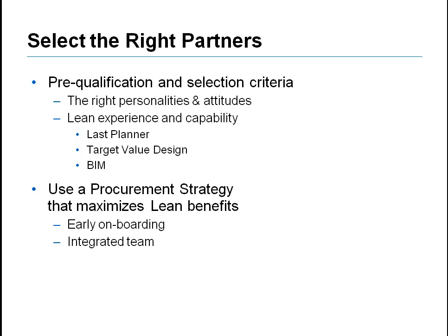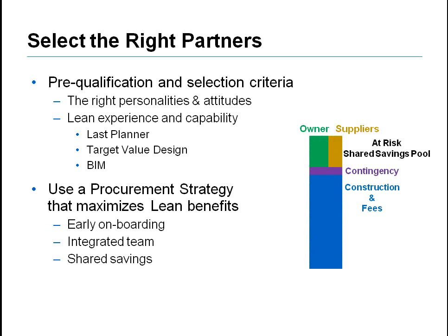Seamless integration of architects, engineers, construction management, major suppliers, and trade detailers to reduce change orders and rework that typically results from groups working in silos. Shared savings for all partners. To realize the cost benefits of lean, incentives are to be contracted to stimulate innovation beginning early in design when there's the greatest opportunity for influence without incurring major change orders. Setting up an incentive pool with key project partners is one way to accomplish this.